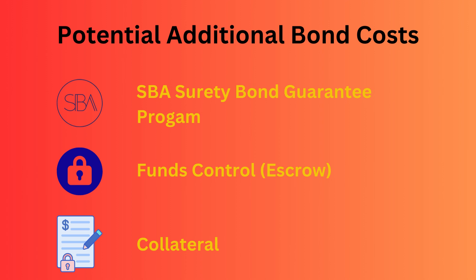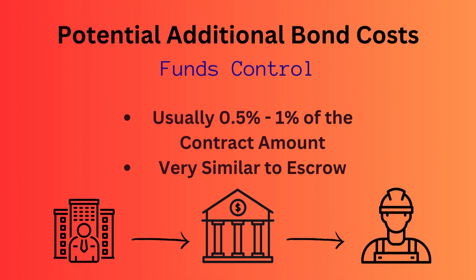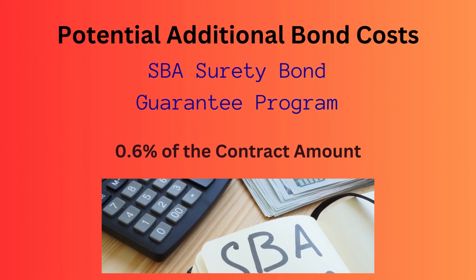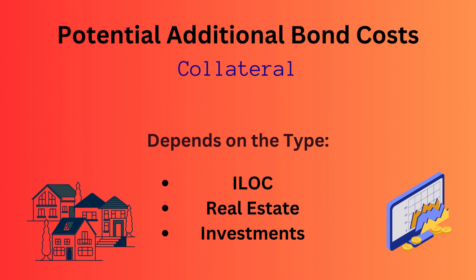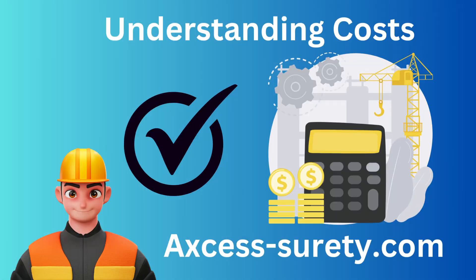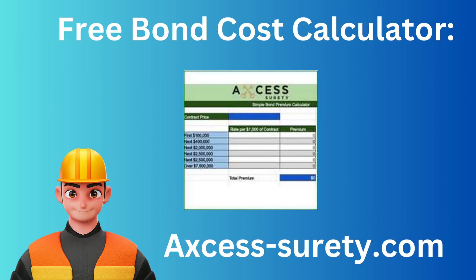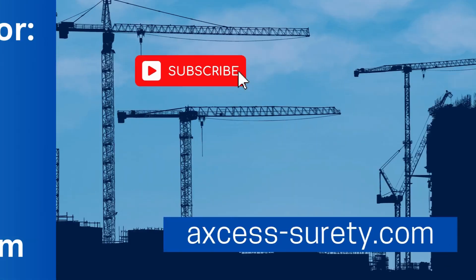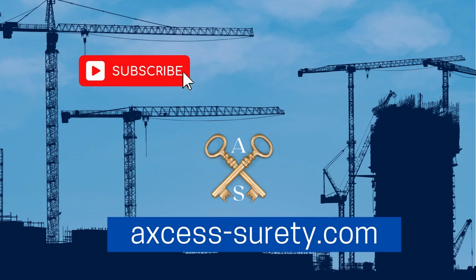Maintenance rates are fairly low when included with performance bonds. However, most bond companies charge significantly higher rates if a maintenance-only bond is needed, and the bond premium for these maintenance bonds starts right away instead of after 12 months. If a surety bond company requires a contractor to use tools to write a performance or payment bond, it will also add to the cost. Three tools used to help write performance bonds include funds control or escrow, the SBA Surety Bond Guarantee Program, and collateral. Funds control generally costs between 0.5% and 1% of the total contract; the SBA Bond Guarantee Program costs 0.6%; and collateral costs depend on type, often involving the contractor's lender if an irrevocable letter of credit is used. If these tools are required, the cost is added to the normal bond premium.